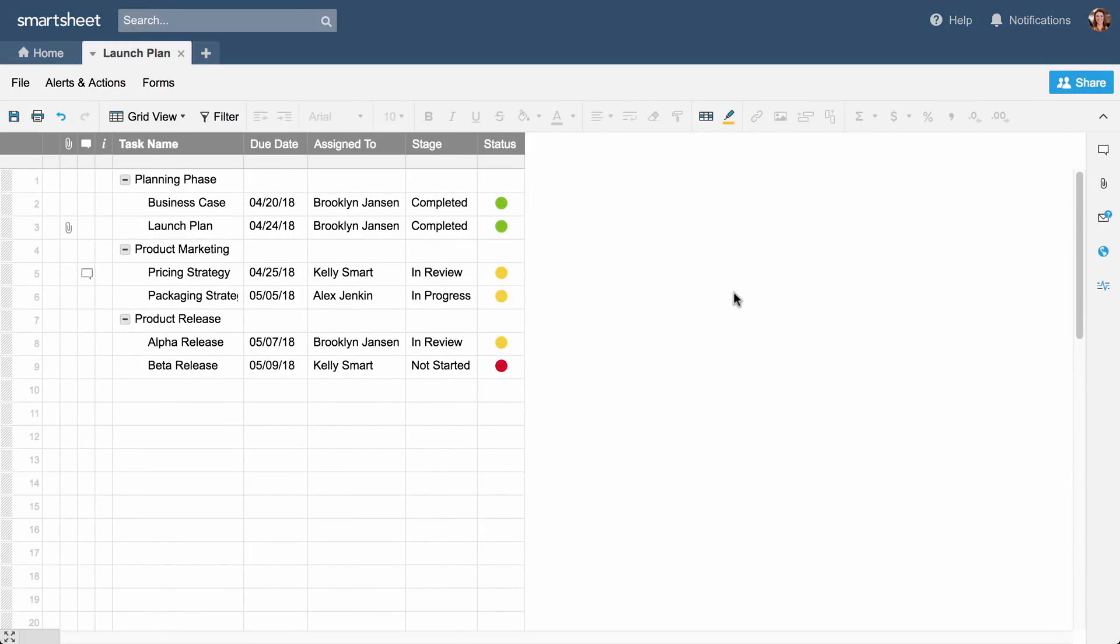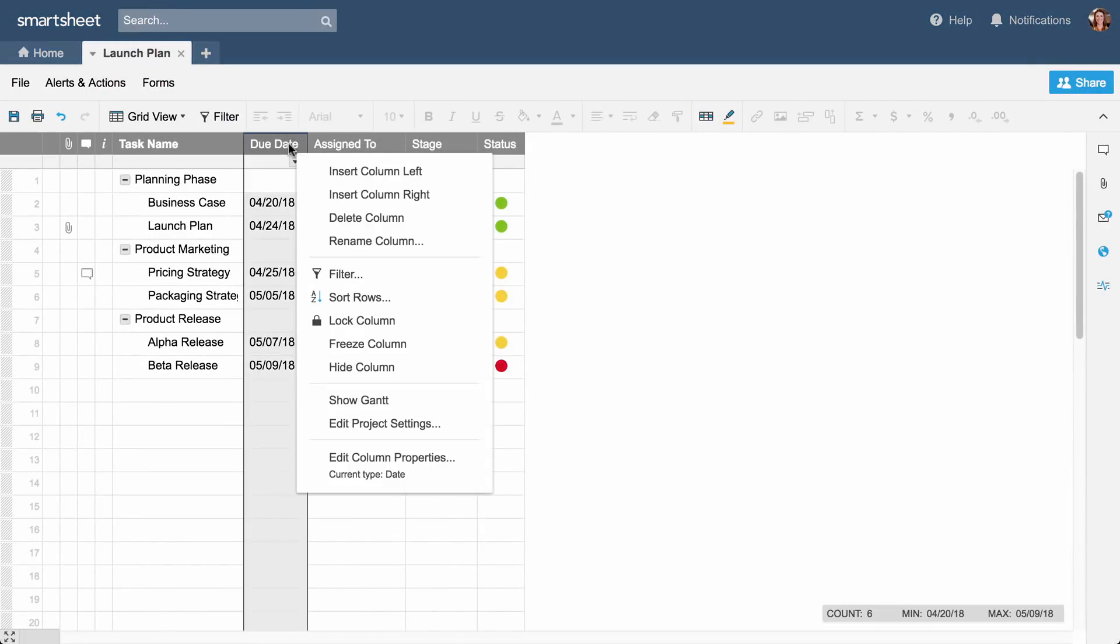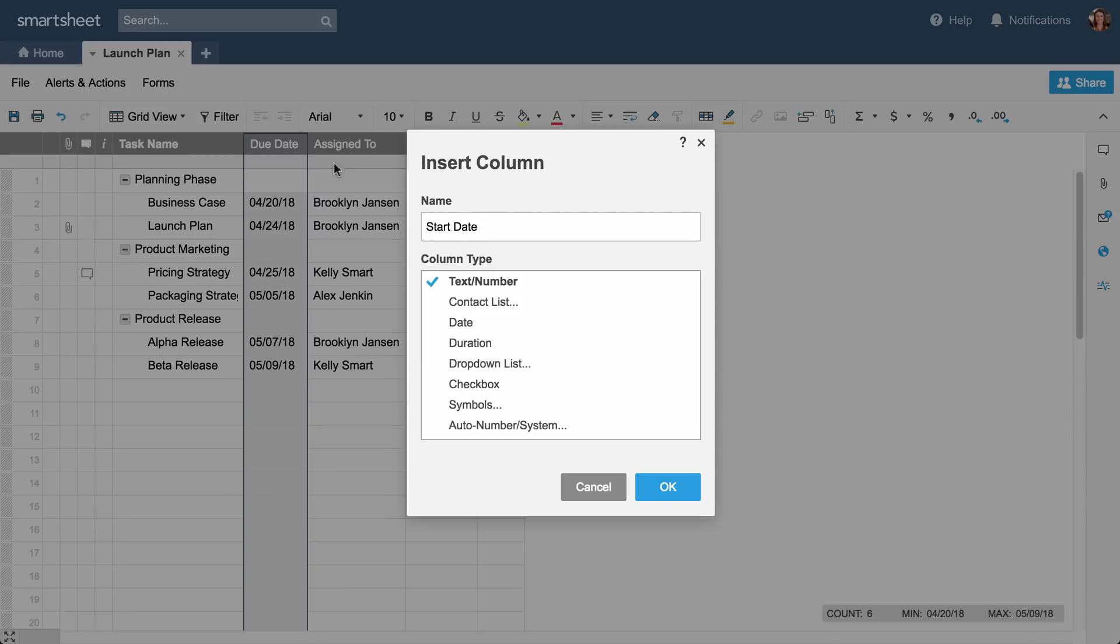You can also view your sheet as a Gantt timeline. The sheet we created has due dates, and we'll add start dates so we can use the Gantt view.